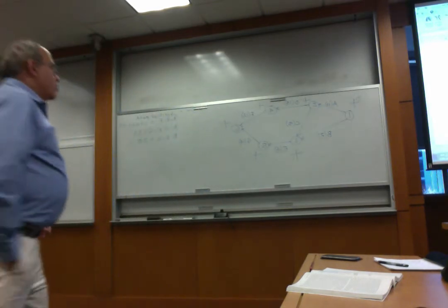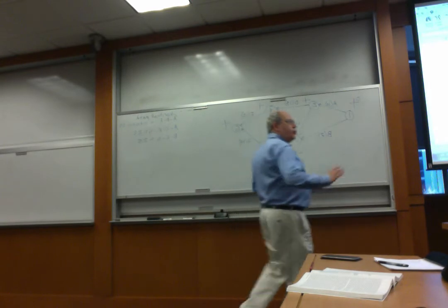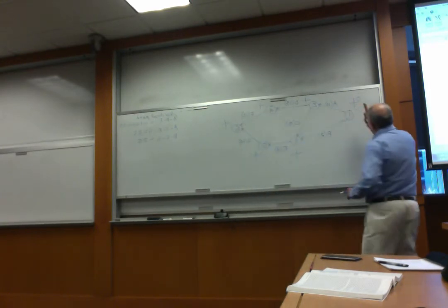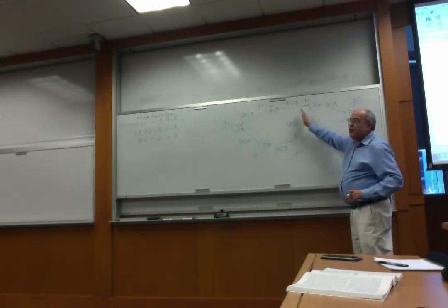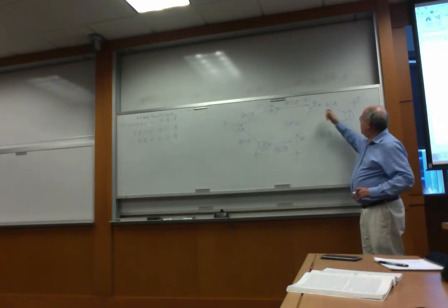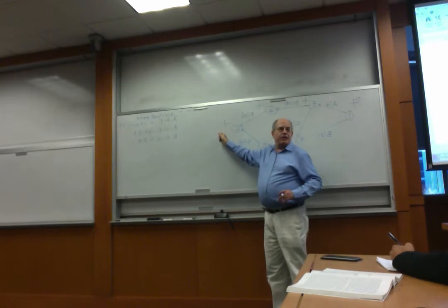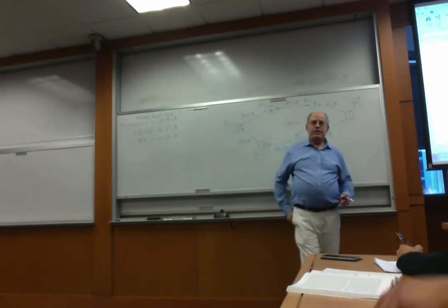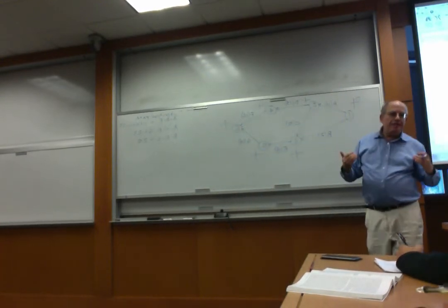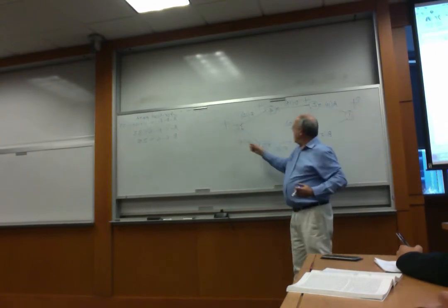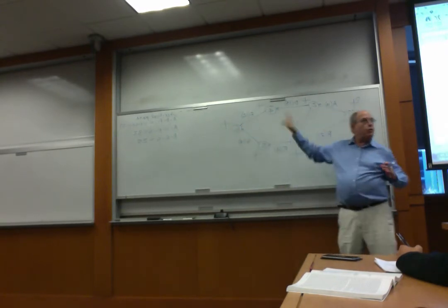All right. As I said, we're going to do it in 2 steps. In the first step, we start from 1 and keep going forward. Forward means from 1 we go to 2, to 3, to 4, to 5, to 6, to figure out how long it's going to take us to get to 6. And then we're going to do everything in reverse. We start from 6 and go 5, 4, etc. But let's go forward first.